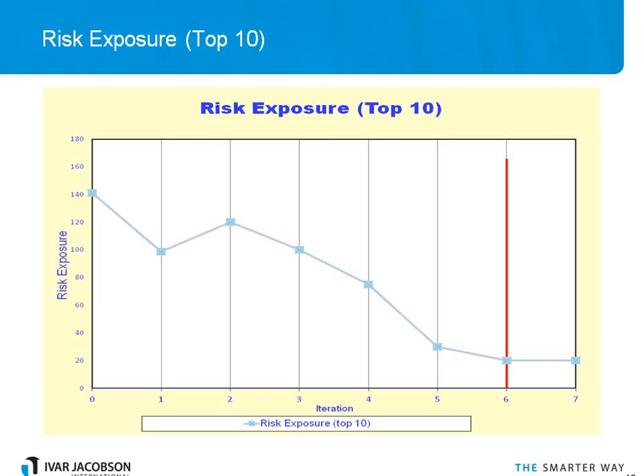It's a Burndown chart. It starts with our high risk. Now you'll notice here we talk about the top 10. One of the problems that you often find with risk management is, one, you don't know all the risks at the beginning of the project, and if you do spend all your time trying to track down all the risks, you might spend weeks finding that there's 200 of them, but you haven't done anything about them. What you want to focus on is the top 10. So find your top risks, do something about them. This allows you to get started very quickly.